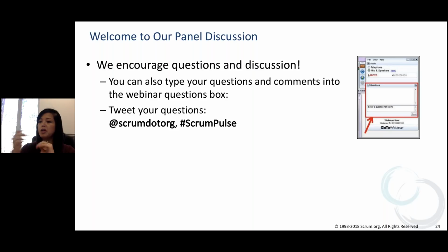Now, we do have an example of an organization where they said, you know what, we didn't find value in going off in our own corners. We wanted to do it all in the open. But by doing it all in the open, they still had their individual sprint retrospectives. They just did everything all at once, though. And that was only 3 to 5 teams. Now imagine if it was 9 teams, 8 teams, 7 teams, how different that might be. That also is going to depend on the level of transparency that you had. So they just did the Nexus level, and then they had some individual team items that they could bring up with their Scrum Masters there, so they could address those, and then they would still close it with the Nexus level item.